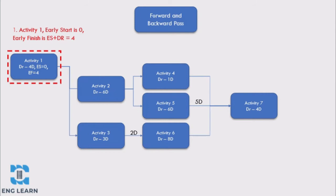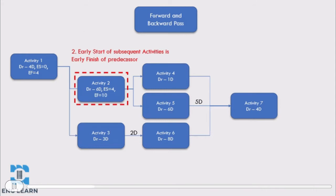The network has seven different activities linked with finish-to-start predecessor relationships, and lags between activity 3 and activity 6, and activity 5 and activity 7. Starting with the forward pass, we start at activity 1. As it is the first activity, the early start date for activity 1 is 0, and the early finish date is the early start plus the activity duration, which is 4 days — so the early finish is day 4. For activity 2, the early start is the early finish of its predecessor, activity 1. The duration is 6 days, so the early finish is day 10.